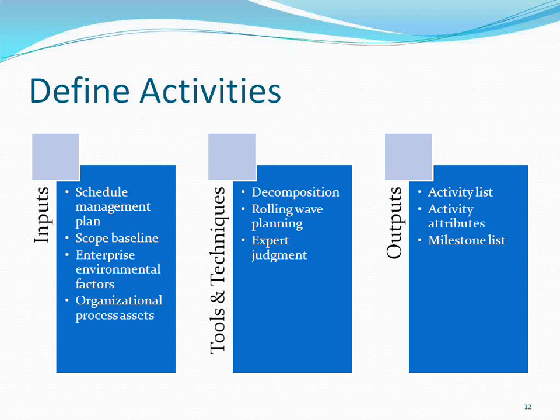First you will divide the work package called foundation, and you will list out what actions you are going to do. To lay the foundation, what do you need? You have to dig the pit. You have to dig the soil. Then you have to raise the foundation. That you will plan in detail. You don't plan in detail what type of paint, or when you are going to do the painting.